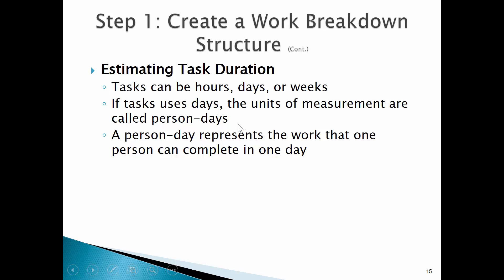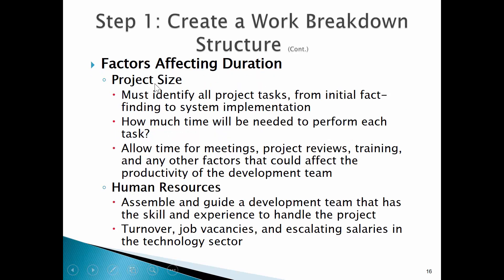Decide how long each task takes. We'll talk about a formula to estimate this because where we really get good at how long a task takes is based on history. How long did it take last time we did it? Tasks can be hours, days, or weeks. Normally on a PERT CPM, we're going to do by days. Units of measure called person days - one person day is a standard eight hour shift.